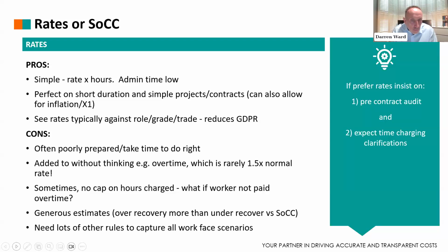When you build these rates up, we often see quite generous estimates for the cost components, and that means there's more likely that they will over recover against the true cost than under recover. And to get it right, you do need rules to capture things like: when does a shift start and end? Are they paid travel time? Are they paid breaks, lunch break, tea breaks?